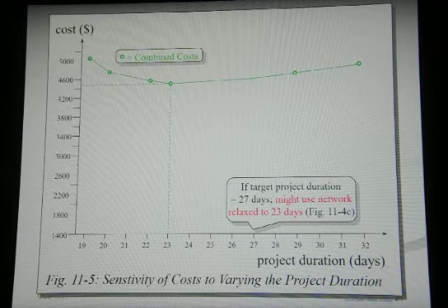However, if we are relaxing some activities to save some money, relax the activities that save you the most amount of money. So relax the activities that have the steepest slope. That's what I would like you to learn the most from this lecture.